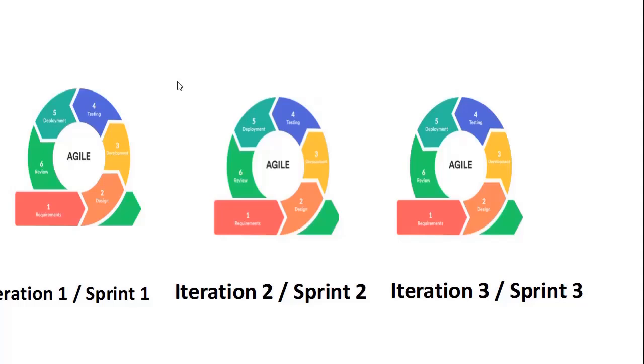In every release, for example, let's say one release has 3 months. In those 3 months, every month or every 2 weeks they treat as a sprint. So usually in the agile process, each and every sprint should be a cycle of 2 weeks or 3 weeks. Every 2 weeks or 3 weeks they will release new features or a new enhancement of that project. So let's say sprint one has 3 weeks. First week for development, second week for testing and everything. In the third week they release this project to the client. They will give a demo to the client. What happened? Only 2 weeks duration.